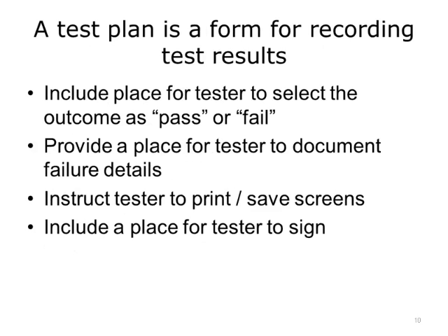A good test plan is not just a list of tests. It is actually a template for the tester to record test results. Include a place to indicate pass or fail, and provide a place for the tester to document failure details. Instruct the tester to print or save screens on the systems involved. Also, include a place for tester to sign.